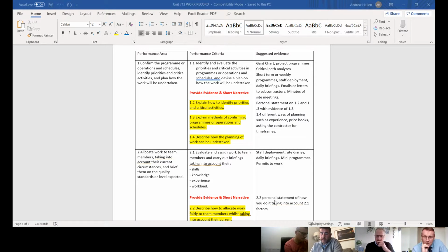Well, the majority of the work's undertaken by contractors anyway, so we don't actually do the work. We're only overseeing the contractors. We'll go out and they'll have areas which are marked up. I've got one starting in Sutton Coldfield Tunnel, I think on the 9th of January, which is quite a big area. I think they've allowed 12 weekends. At the minute they're only preparing all the paperwork for it, but basically on the first shift they're going to go in and mark the whole tunnel up.